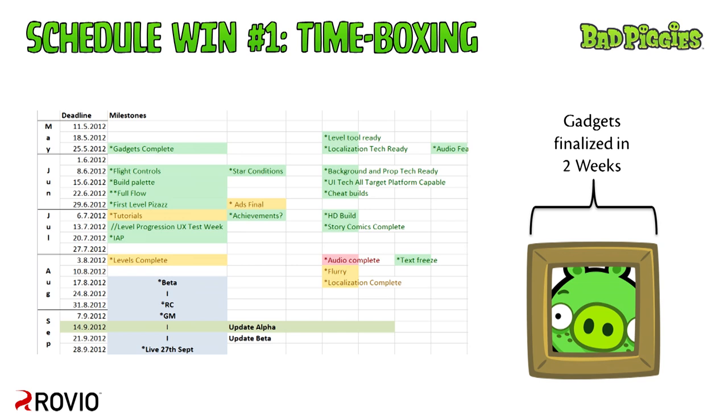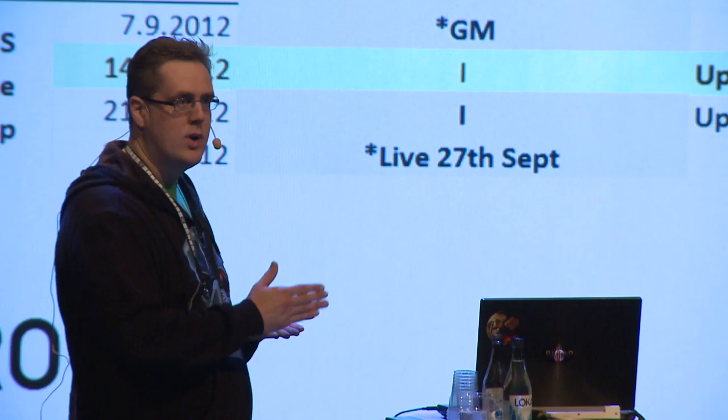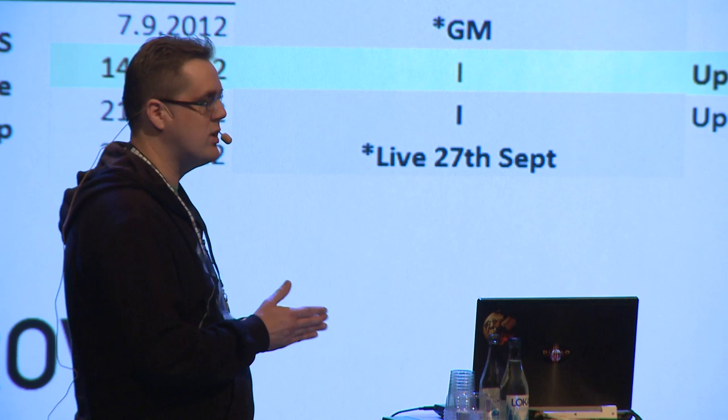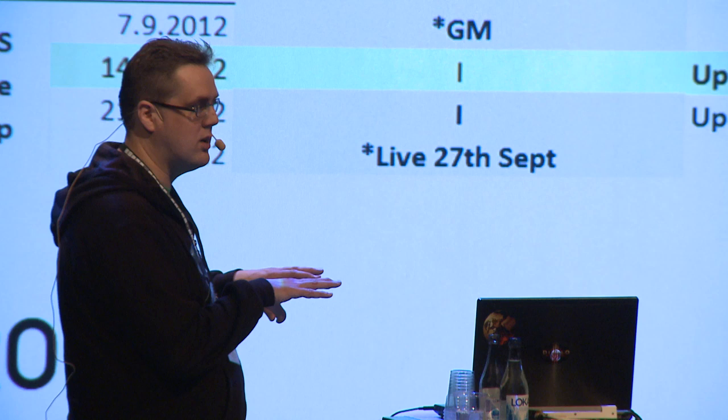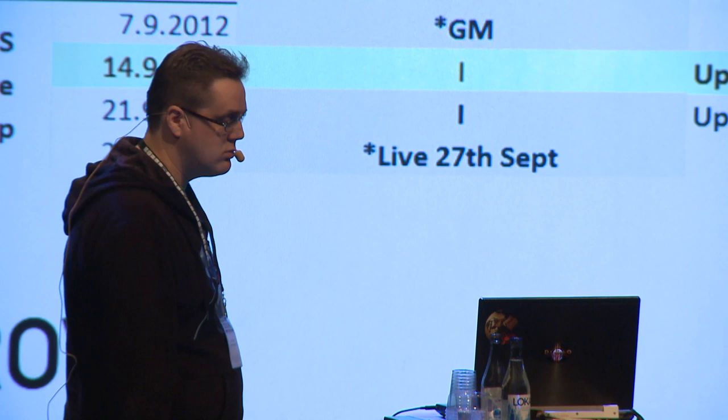tweak everything, have them look final. And at the end of 2 weeks, that's what we will go with. Or if not, then the project will simply fail. There's no time then to do levels, because you really need this to be settled for full-blown level productions to start, for example. And it turned out surprisingly well, which is why I'm telling you this. I wouldn't if it didn't.